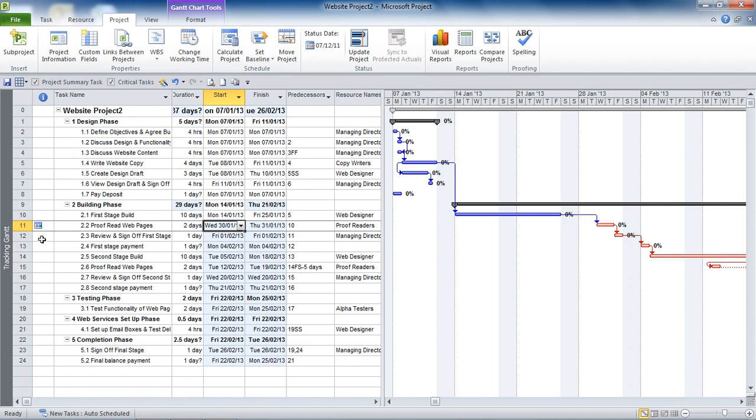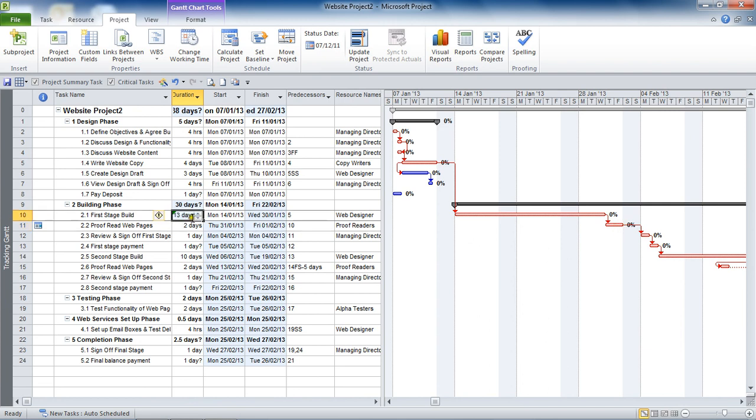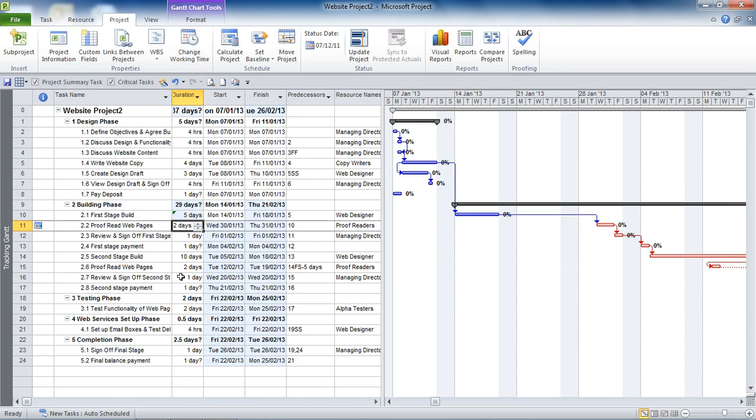But for now we have this constraint saying this task cannot begin before that date. So if the task before it, the predecessor, was to take any longer, such as 13 days, then we'll see that that task will move on the critical path, change a bit there, and that task will begin later. However, if this task was to happen a little bit quicker, and I'll put it as five days, then you'll notice that task will not move before that date that I put in. So it's constrained.